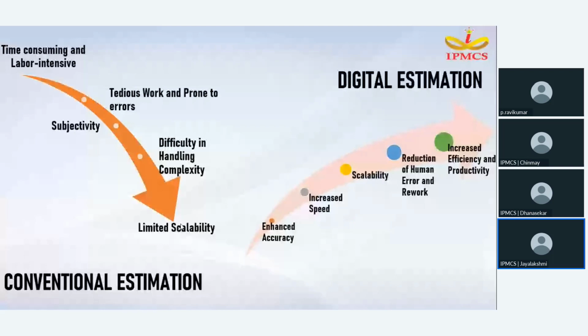The main disadvantage is that it is very time consuming and labor intensive. It is very tedious work, and since a lot of human effort is involved, it is prone to errors. The format of the Excel sheet also differs from each estimator, as each has different views. Complex drawings are very difficult to handle. And lastly, if we have a scale drawing, that is good. Otherwise, it is very difficult for estimators to determine the scale of the drawing.